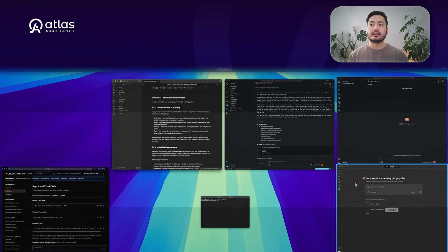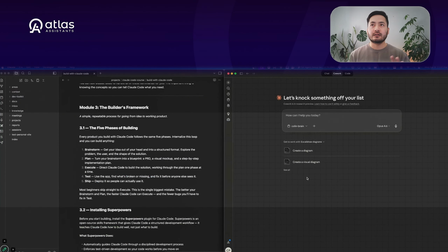How you do that is you brainstorm and then you get Claude, Chat, whatever, to create something called a PRD, which is a product requirements document. Think of it as a brief. In this case, because we're building a personal brand website, it's essentially a creative brief. The same way with any creative project, before you dive into building, you create the brief first. You take the brief, you create a project plan, and then you go and you execute it.